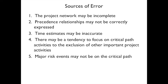Sources of error in scheduling: the project network may be incomplete — you may have forgotten something. Precedent relationships may not be correctly expressed — for example, you say you can't start B before A, but in reality you can start partway through. Time estimates may be inaccurate — saying A takes 10 days when it really takes 12. There's also a tendency to focus on the critical path while neglecting other important activities, and major risk events may not even be on the critical path.